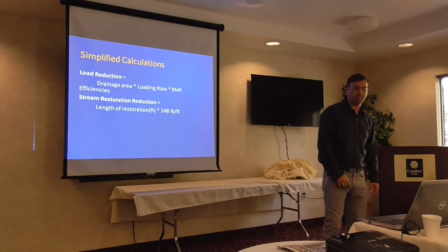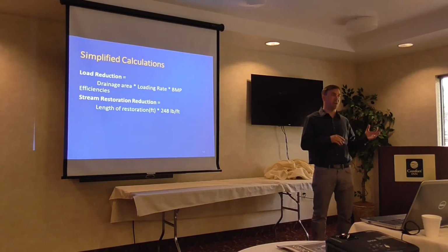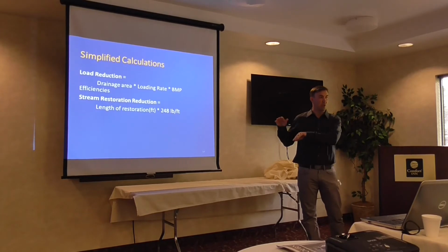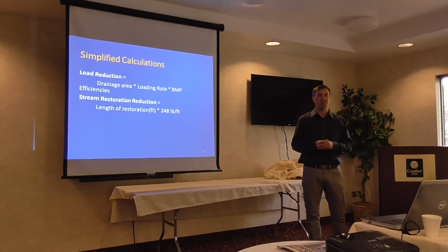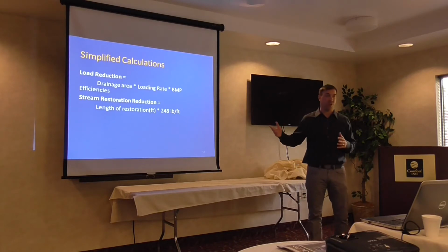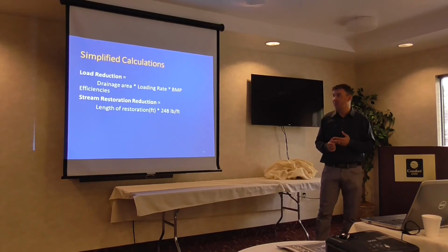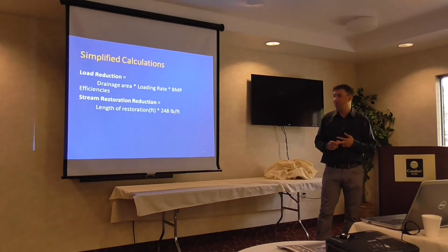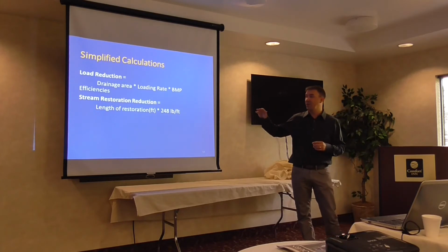water quality benefits. And just some simple calculations. Again, I think as you get further into the concept design phase, these will get more specific, more fine-tuned. But for just this initial planning phase, or retrofit reconnaissance phase, we're just trying to narrow down the list. You'll have your load reduction, so you're going to have your drainage area estimate that you've calculated either from plan sets or from the field or a combination of both. You'll have your loading rate, either pulled out of the CAST tool or out of MapShed or maybe some other data you have, and then you have your BMP efficiency.